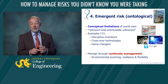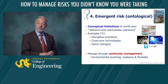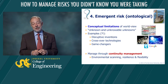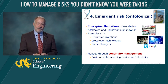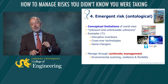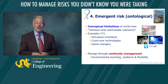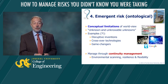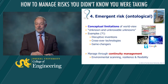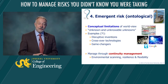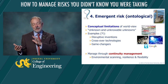It's a bit like business continuity management. Business continuity management says there may be some disaster — let's say it takes out my entire IT system or prevents half of my workforce from getting to work. I don't know what that thing might be, but business continuity management says let's prepare a contingency plan, so if something takes out my IT or stops half my people coming to work, I can recover and continue. We could do the same kind of thinking for our projects — project continuity management: if something happened which I can't imagine but would affect my project in a major way, how could I recover and continue? So we need to build resilience and flexibility into our project plans, and have a good environmental scanning system that looks out around us and says: what signs are there that something might be about to change in our environment which could widely affect our project?